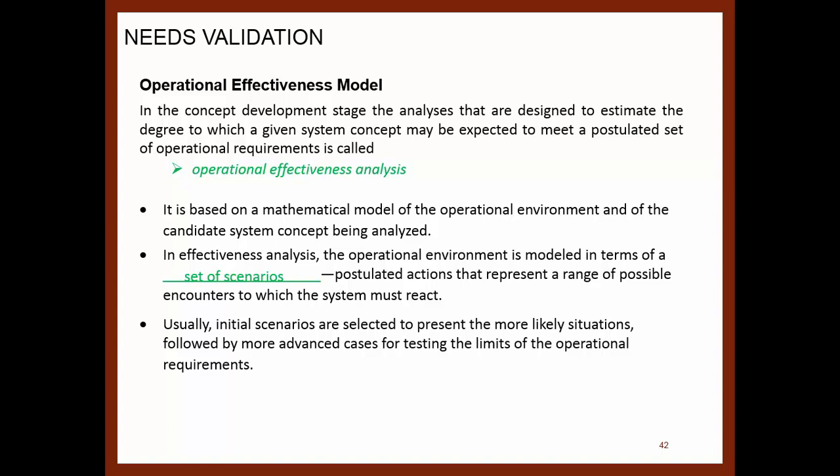Set of scenarios. So if you are building a system that is going to be working at night, during the daylight, in cold weather, hot weather, is that important for your system? You have to create these scenarios for testing purposes and see how the system is going to react. Usually, initially scenarios are selected to present the most likely situations, followed by more advanced cases for testing the limits of the operational requirements.